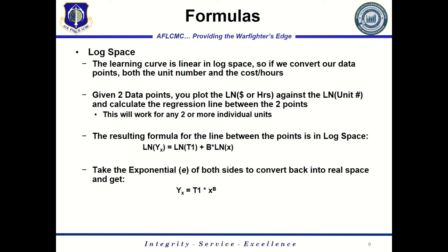And we'll walk through all this in Excel in a minute, so we can show you how to do those calculations in Excel. And this converts you back to real space. And that's where we get y equals T1 times x raised to the b.